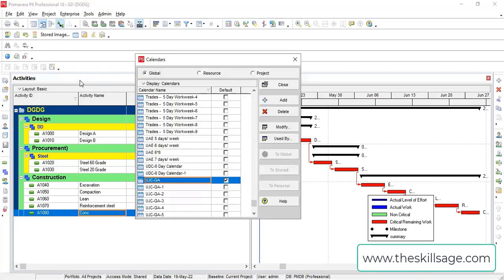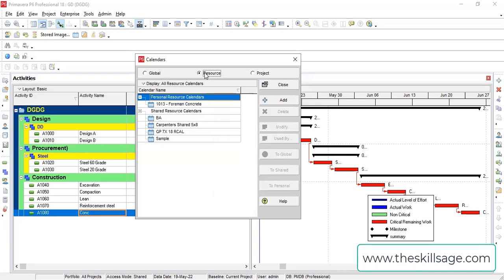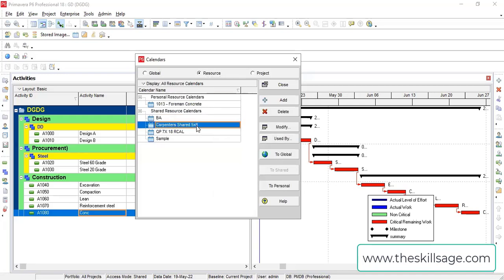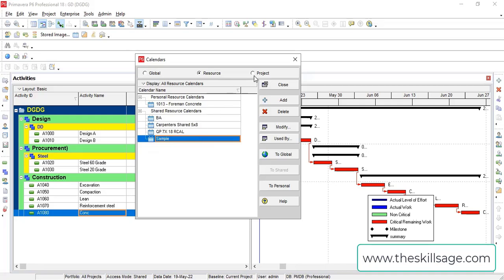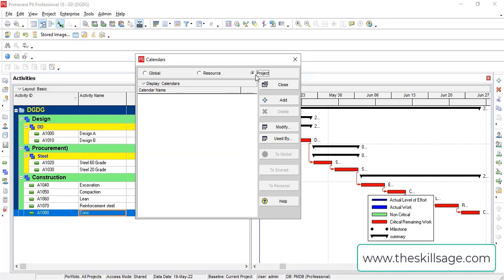To understand calendar, we are given three different kinds of calendars. There is one global calendar which will be assigned to our project activities. Then there is a resource calendar which will be assigned to our resources and resource-dependent activities. And then there is project calendar for shared applications.